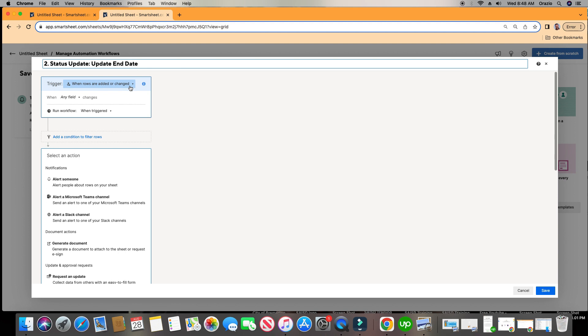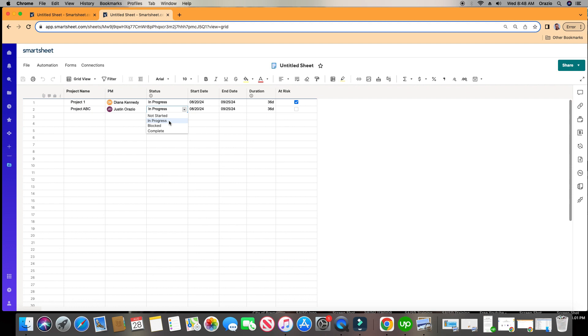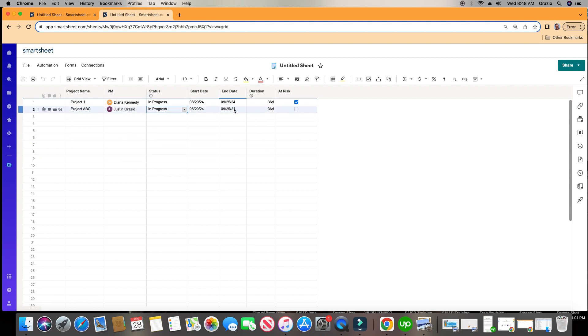What we're going to do is set up a status update that will automatically go out when the status changes to In Progress. We want our PM to change the end date when the status changes to In Progress — so whenever the status column changes to In Progress, whoever the PM is for that same row will be prompted to update the end date.